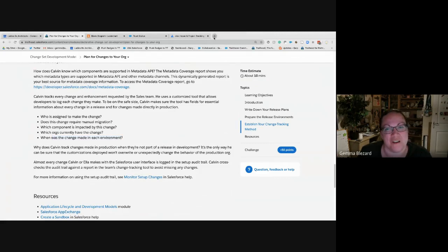To be honest, I also just used to do, in my simple spreadsheet, what's the label? What's the API name? What type? What kind of item is this? Is it a field? Is it an object? Is it a flow definition? If it's a field, are there any picklist values I need to know about? Are there any validation rules sitting over the top of it? And are there any dependencies? And I ended up with this great big long sheet, in some instances, full of config that I could just manually eyeball check between the two.